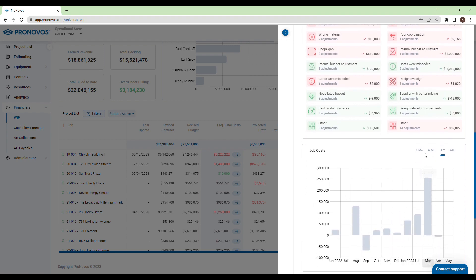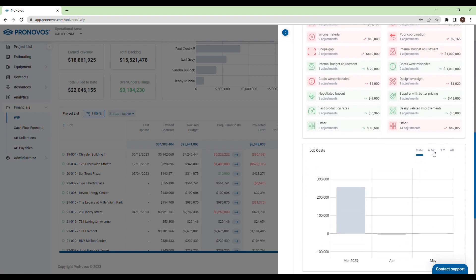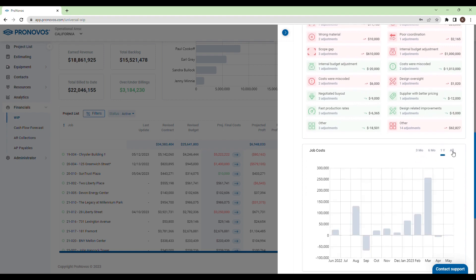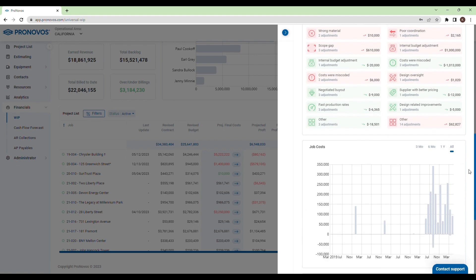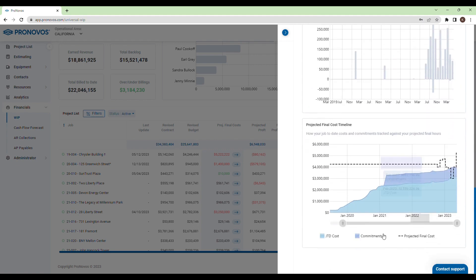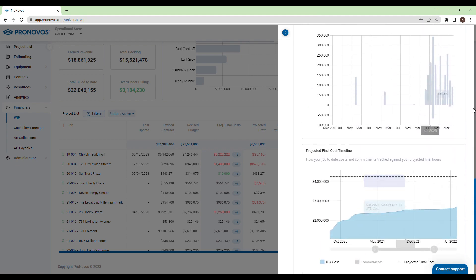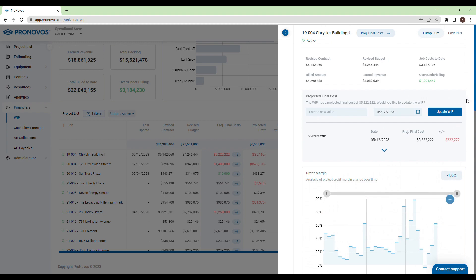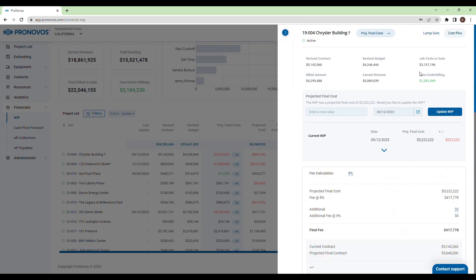Pronovo's enhances your understanding with charts of job costs progression over the course of the project. For cost plus projects, you can input a fee to get an updated projected final contract amount based on the projected final costs.